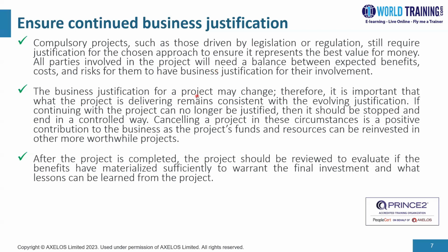Now, the justification for a project may change. Therefore, it's important that what the project is delivering remains consistent with the evolving justification. If continuing with the project can no longer be justified, then it should be stopped and end in a controlled way. Now, canceling a project in these circumstances is a positive contribution to the business because the funds and resources can be reinvested in other more worthwhile projects. Now, after the project is completed, the project should be reviewed to evaluate if the benefits have materialized sufficiently to warrant the final investment and what lessons can be learned from the project.